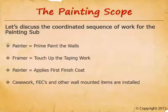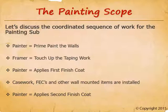After the first finish coat, fixed wall-mounted items such as casework, fire extinguisher cabinets, and corner guards are installed. Easily movable items like marker boards, tack boards, and pictures are not installed until painting is complete. The painter then applies the second and typically final finish coat, taping off all installed wall-mounted items. Walls throughout the industry usually receive one prime coat and two finish coats. The second finish coat is applied last because walls receive scratches and dings during the final phase of finishes, ensuring a clean handover to the owner.